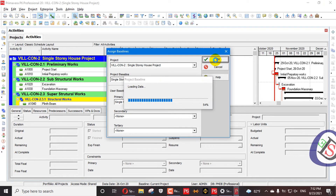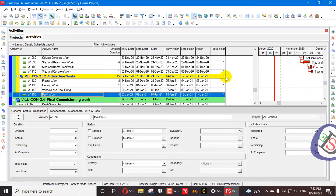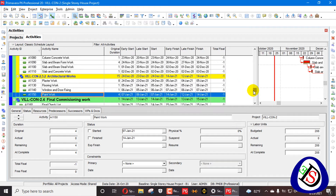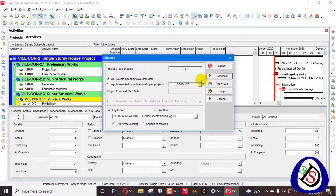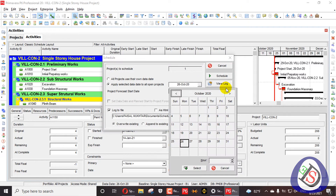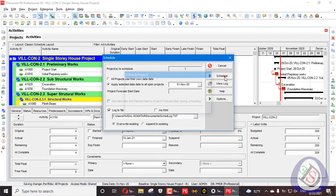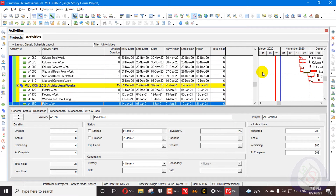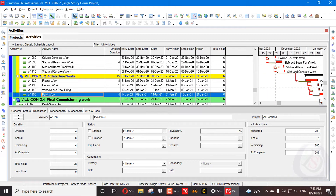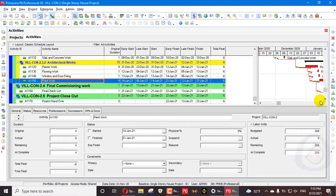In the monitoring phase, the first important thing is the completion of your project. If your project goes ahead, the total float changes. I apply the go-ahead option and schedule my project on 1st of November. When I schedule, you will see my float changes — it has changed to minus 6. So my project is in delay, as you can see from the baseline comparison.